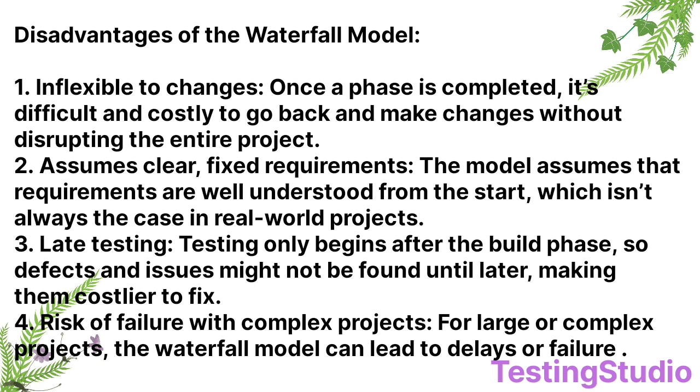Third, late testing. Testing only begins after the build phase, so defects and issues might not be found until later, making them costlier to fix. Fourth disadvantage is risk of failure with complex projects. For large or complex projects, the waterfall model can lead to delays or failure.